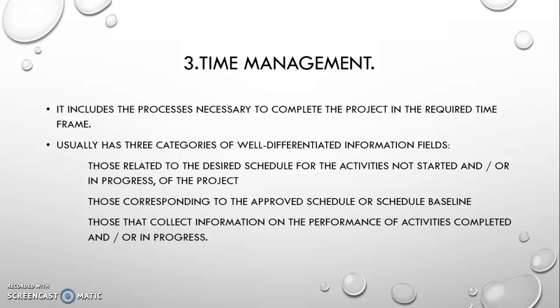3. Time management. It includes the processes necessary to complete the project in the required time frame. Said model is a database that collects information such as the list of activities to be carried out, the links or sequences between them, the start and end dates of each activity, and many more. Through the model, reports can be made that facilitate the study and management of the project schedule, for example, network graphs or the bar chart.